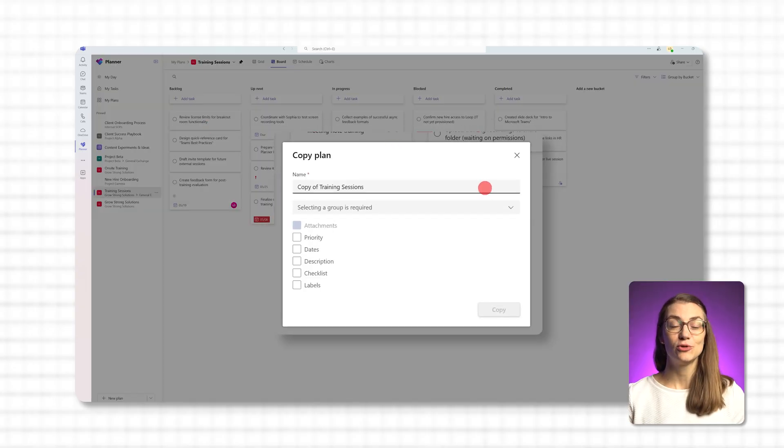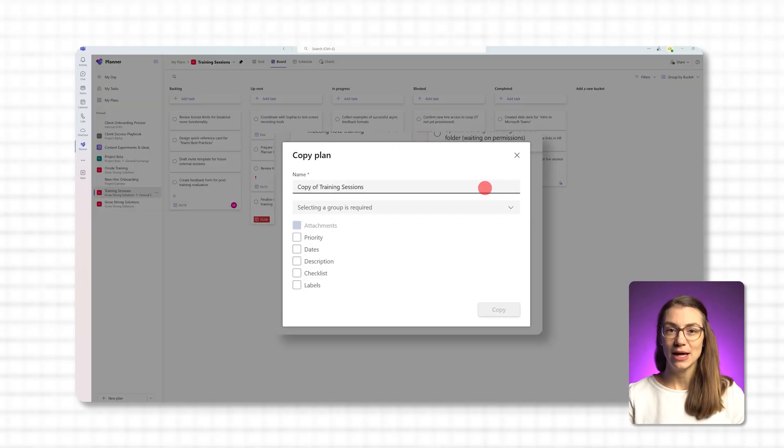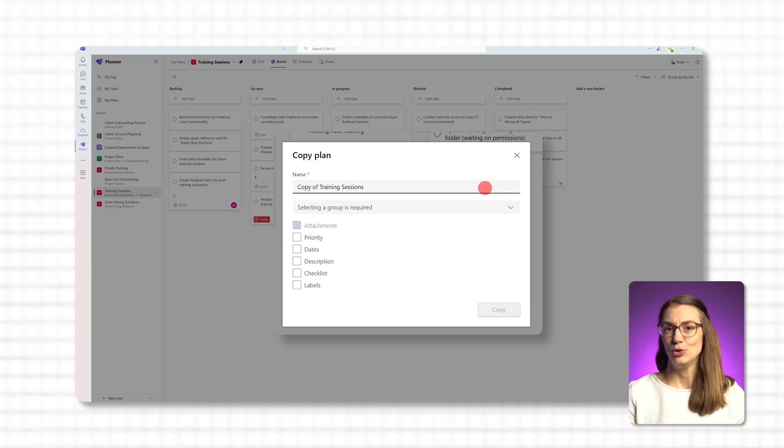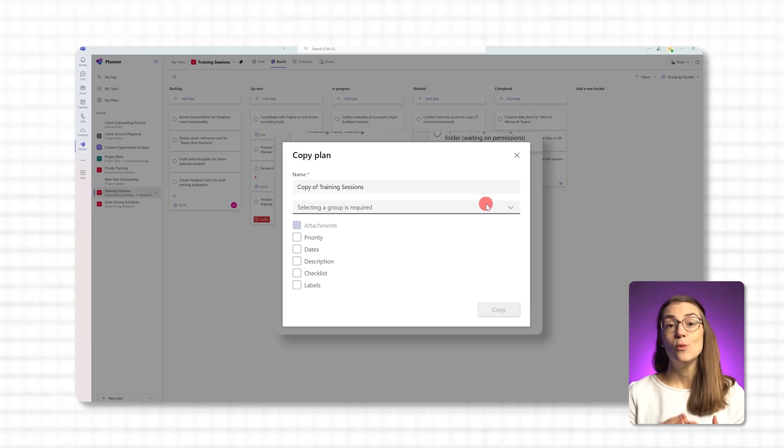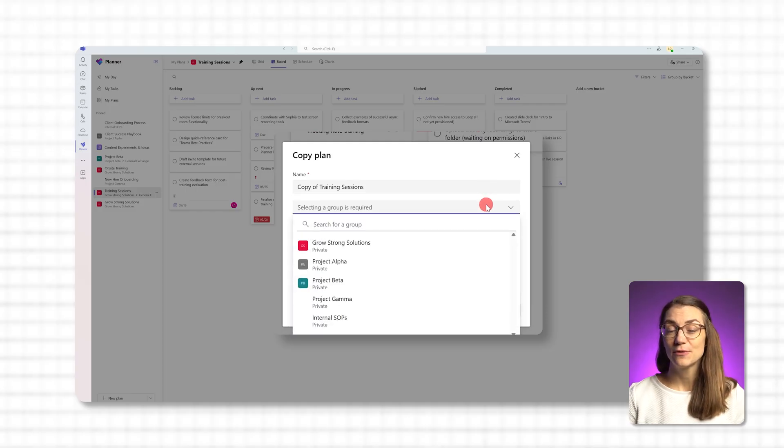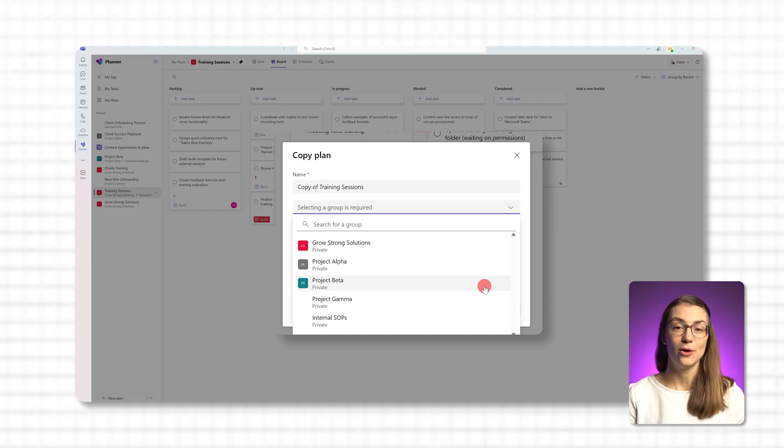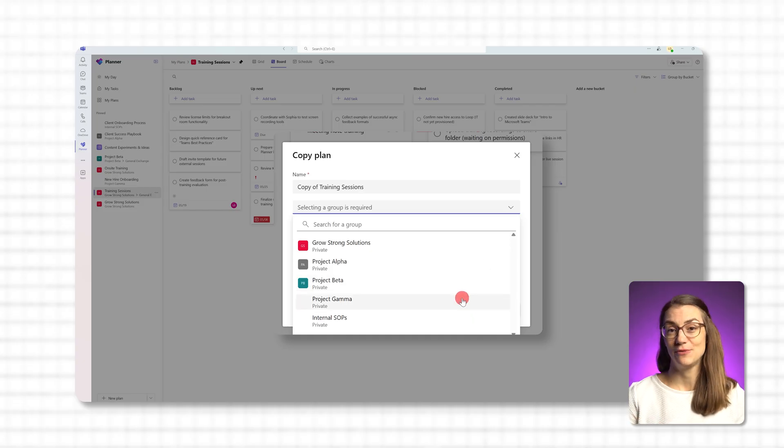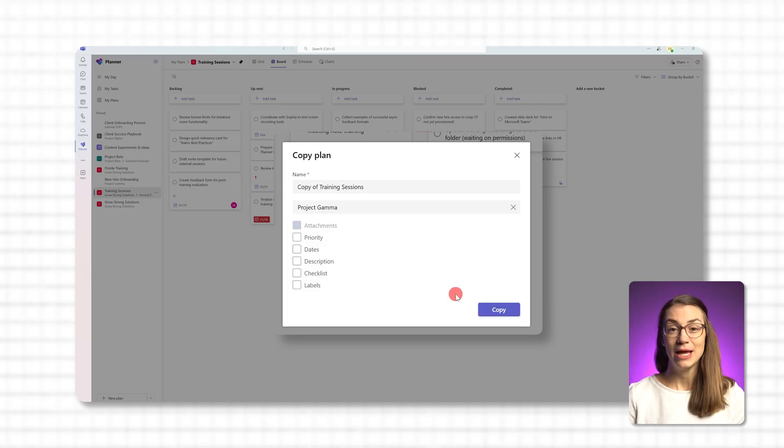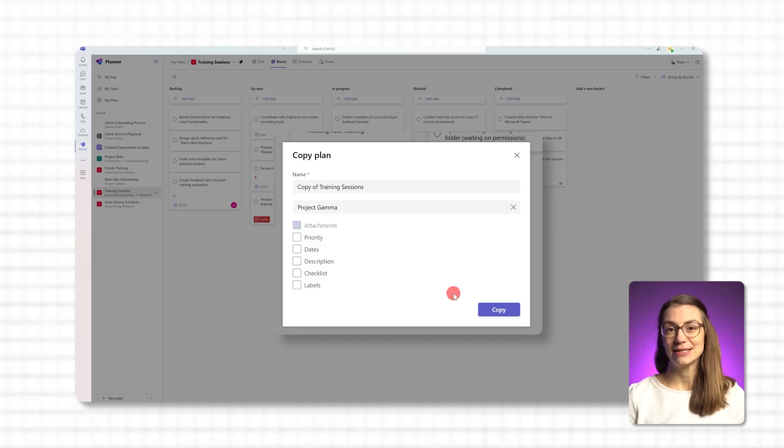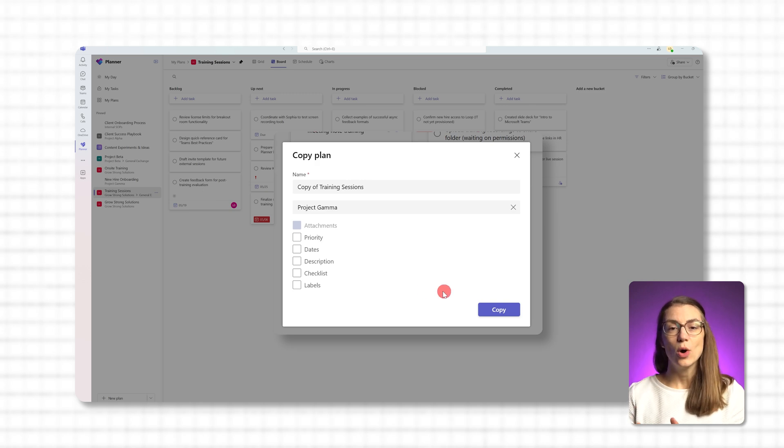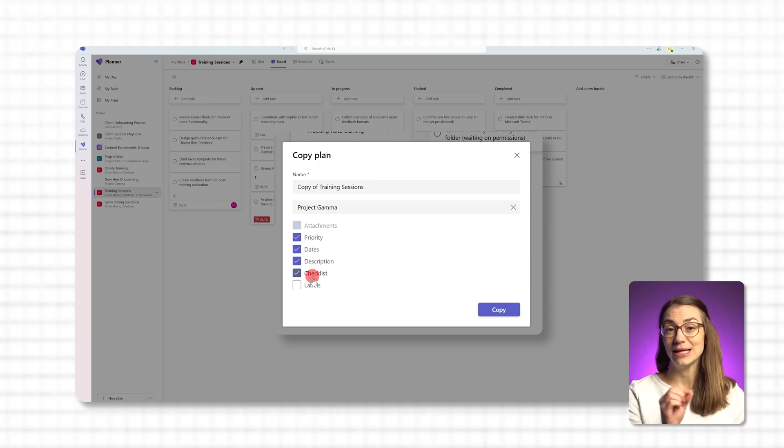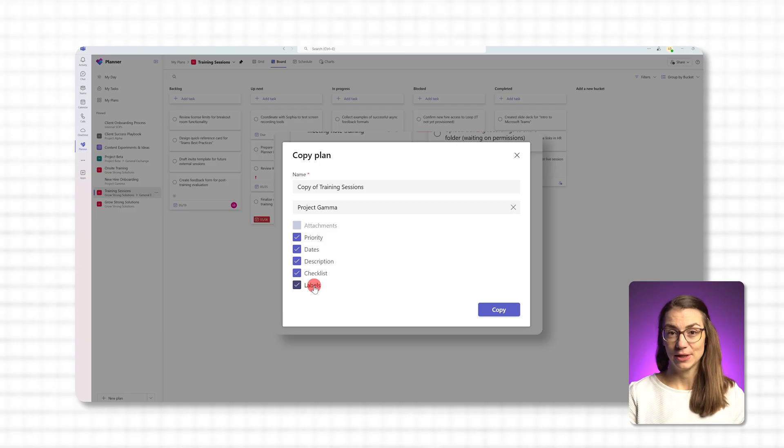Here you'll be prompted to name your new plan, such as Q4 Launch Template, and choose which Microsoft 365 group it should belong to. By choosing a Microsoft 365 group, you determine who will have access to the plan. Then, you can decide what parts of the original plan to include in the copy.